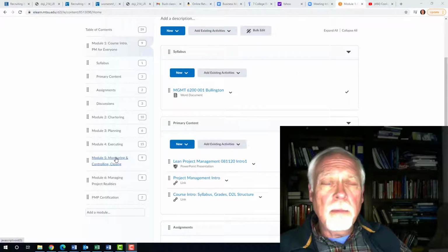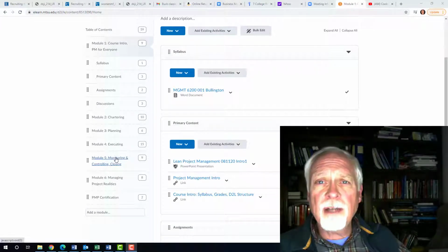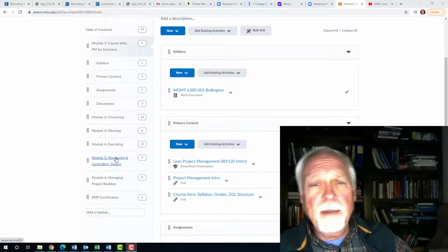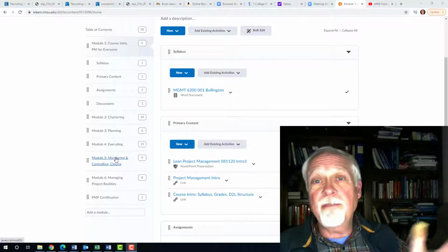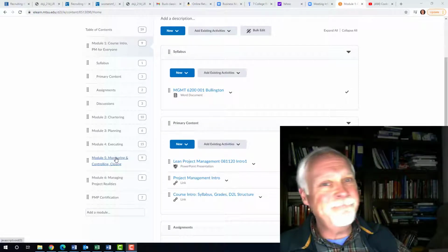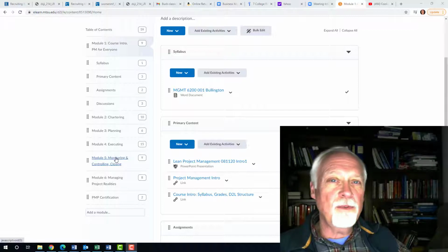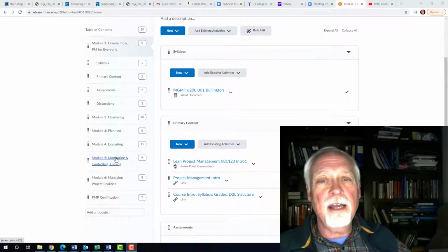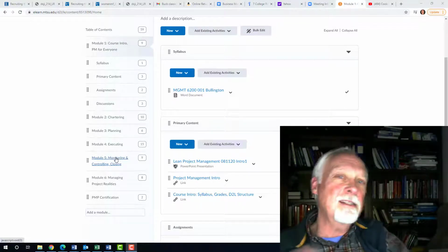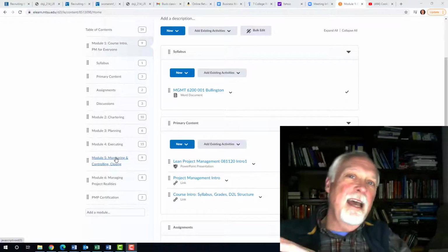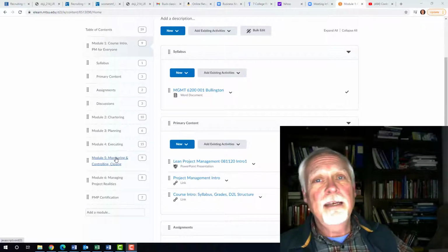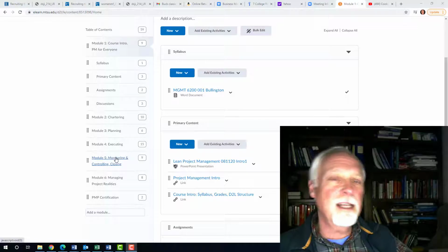Now, people have used a lot of different types of projects, and I don't want to constrain it too much. I do want the project to be meaningful, and so for instance, I've had people suggest baking a new dish, and I said, that's not enough to be a project. That's really more like a task than a project. Now, if you were doing this for a restaurant and you had a number of trials and pilots, and you had taste testers, and you had a long rollout to actually serving in a restaurant, that would be a project. But just trying out a new recipe, that's not a project.